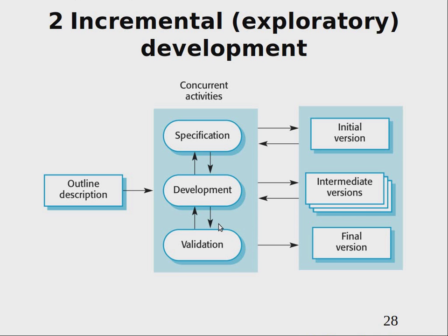But for iterative approaches, one of the most critical tasks or activities you need to do is to check your progress, so that you are not going into an infinite loop. Otherwise you may just be chasing the latest and greatest versions of programming languages and programming frameworks, but you will not actually implement anything more than in the initial specification.